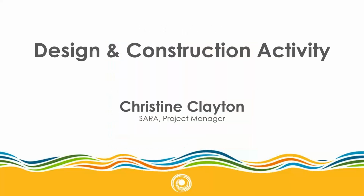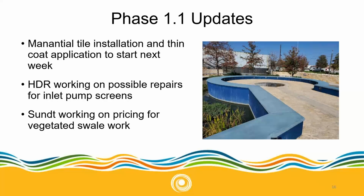Now we have design and construction activity with Ms. Christine Clayton. Go ahead, Christine. Good morning, everyone. I have a few more updates on the open park. As you can see in the photo, at the Monontiel, we had some issues with the tile a while back. It had been removed and we had painted it blue temporarily. Fortunately, we have been able to get all new tile fabricated, shipped, and received. Sun has been out there prepping the surface. They removed that blue paint and we are expecting to start installation of the new tile next week.